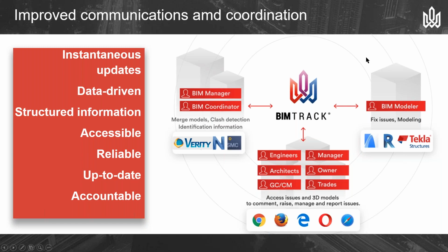You can create automatic reports to be sent to certain stakeholders on the project. You can actually schedule that every Friday, there's a report for pending issues assigned to the architect being sent out to them. So when they enter the office in the morning, they see that PDF report in their mailbox. And they've got easy access using the web-based viewer.